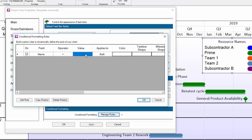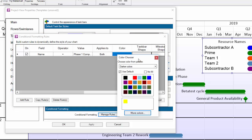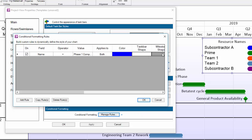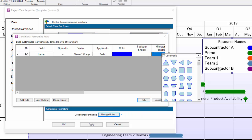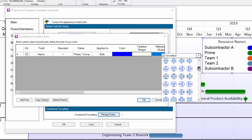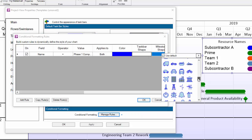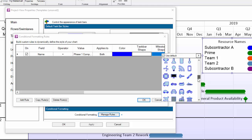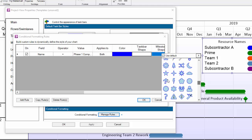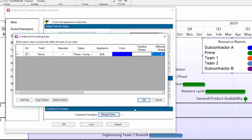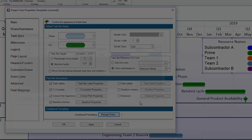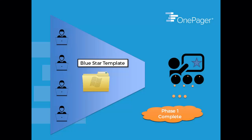For example, I could tell OnePager, if you see a value of phase one complete in my task name column, I want you to make this shape a blue star. If I code this rule in and then save it back to a template that I then share with my team, whenever OnePager sees phase one complete, it's going to make that shape a blue star. Nobody has to think about it.